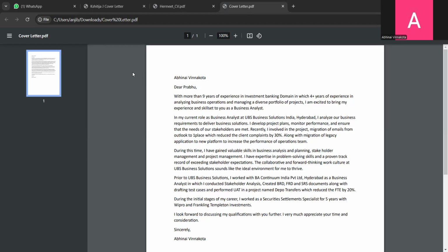And DOD comes after developing the feature. It should pass the acceptance criteria which was created so that the product owner should accept. At the end of the day, whatever feature is being developed, the product owner should be happy with that. Then the product owner will make sure that he is delivering the same to the business or the operations team as well. Definition of done will make sure that we have done all the tests and it has passed the acceptance criteria and everything.